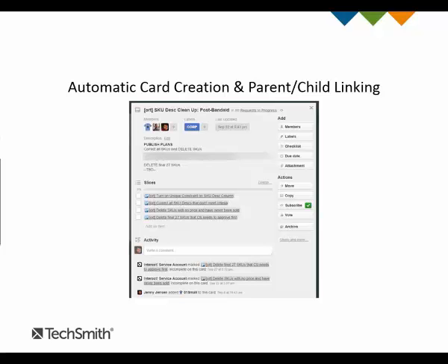When it sees all of those things together and the request card is in the in progress column, it will look at the slices and say, okay, cool, there are slices here. And it will take the short name and the label, put it on the new card, which then has the title of the slice that you put into the checklist, and put it onto the corresponding board. In this case, we got lucky where Trello's labels and board colors are pretty much matched up. So the blue label sends the slices of the request to the corp child board. All 4 of those slices at one point or another ended up on the corp work in progress board.